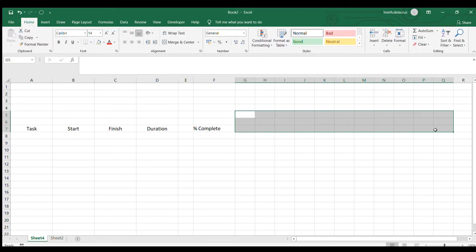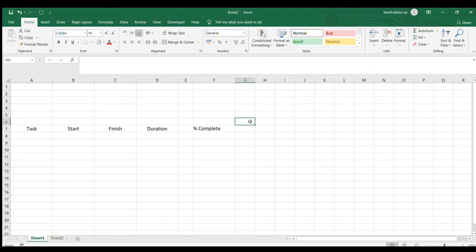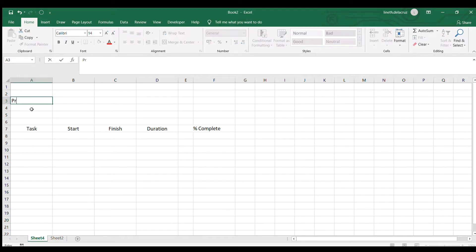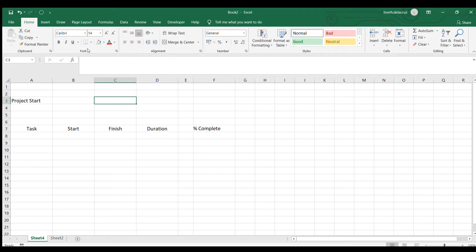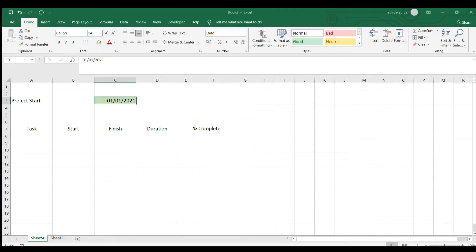Now on this part are the dates. I'm going to work on this cell and I want to get the date but the format will be a number — for example, January 1, I want to get 1, 2, 3, and so on. To do that, let me make a project start cell colored in green and put a sample date of January 1. I'll use a custom format of date, month, and year for that. Then make it centered and just make a reference from it.